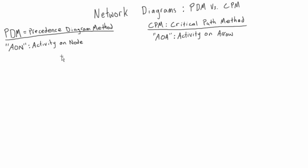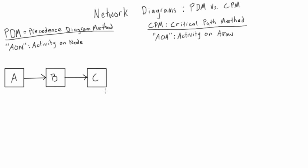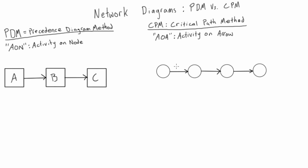When we draw a PDM network diagram, our activities are on the nodes, and the nodes are connected by arrows. The arrows have no duration — they're sort of like a point in time, just connecting activities with logic. With CPM, this is activity on arrow, so instead of the activity being on the node, it's almost an inverse — we have the activities on the arrows and the nodes represent points in time. So it looks like activity A leading into activity B, which leads into activity C.